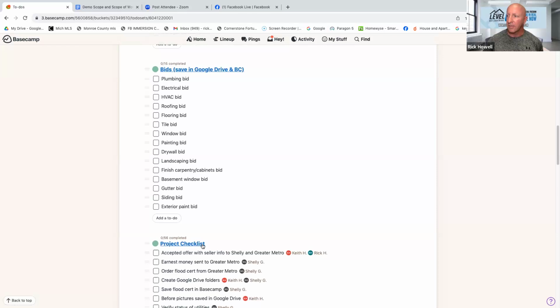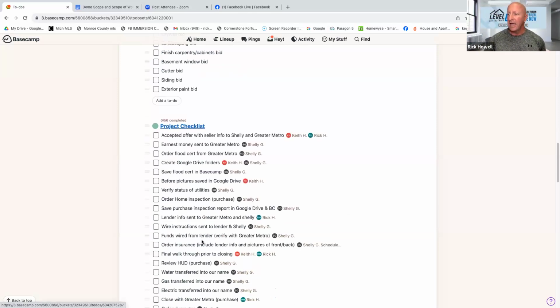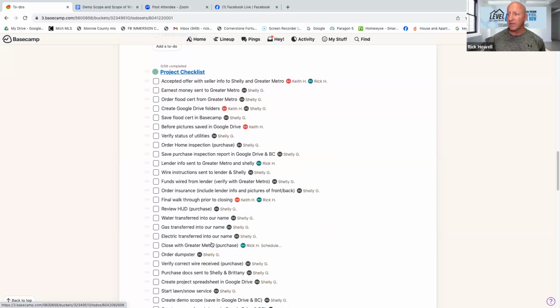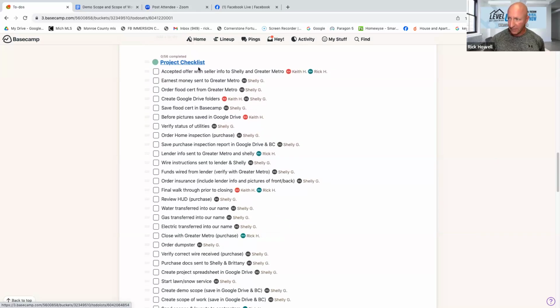So here it goes. Now, imagine we closed on the deal. What's the first thing we do? The first thing we do is we come in Basecamp. My sister will handle this, and she'll make the checklist for what needs to be done with the project. You'll see here, from the accepted offer all the way to earnest money gets sent over to the title company. And in our market, we order a flood certification. The title company will do a flood cert, meaning they'll verify whether the property is or is not in a flood zone, right?